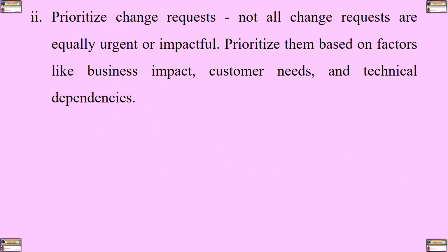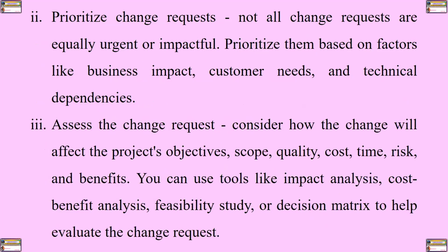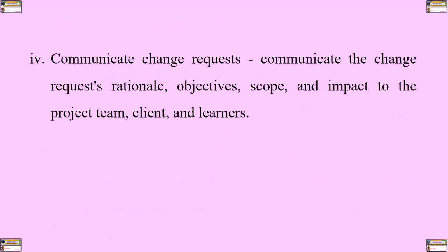Number two is prioritize the change requests. Not all change requests are equally urgent or impactful. Prioritize them based on factors like business impact, customer needs, and technical dependencies. Number three is to assess the change request. Consider how the change will affect the project's objectives, scope, quality, cost, time, risks, and benefits. You can use tools like impact analysis, cost-benefit analysis, feasibility study, or decision matrix to help evaluate the change request.